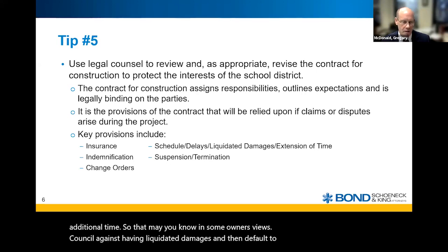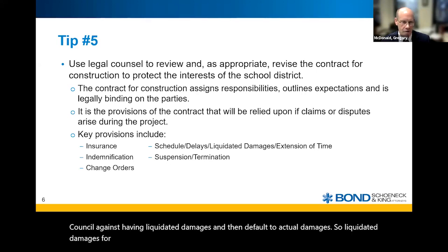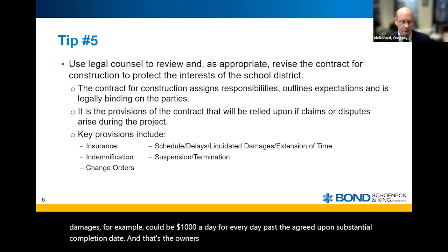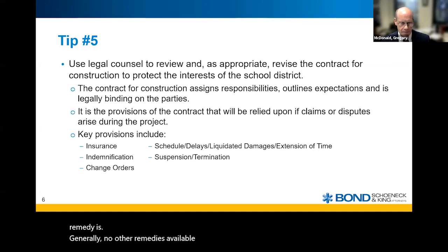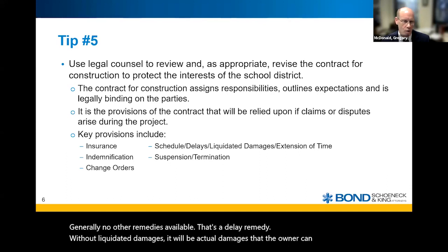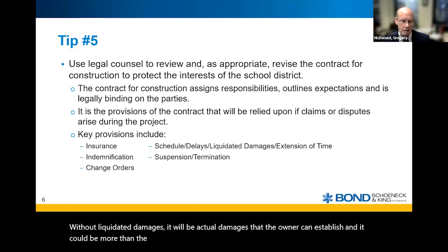Liquidated damages, for example, could be $1,000 a day for every day past the agreed upon substantial completion date. And that's the owner's sole remedy in the event of a delay; generally no other remedies are available. Without liquidated damages, it will be actual damages that the owner can establish. And it could be more than the liquidated damages, or it could be less.